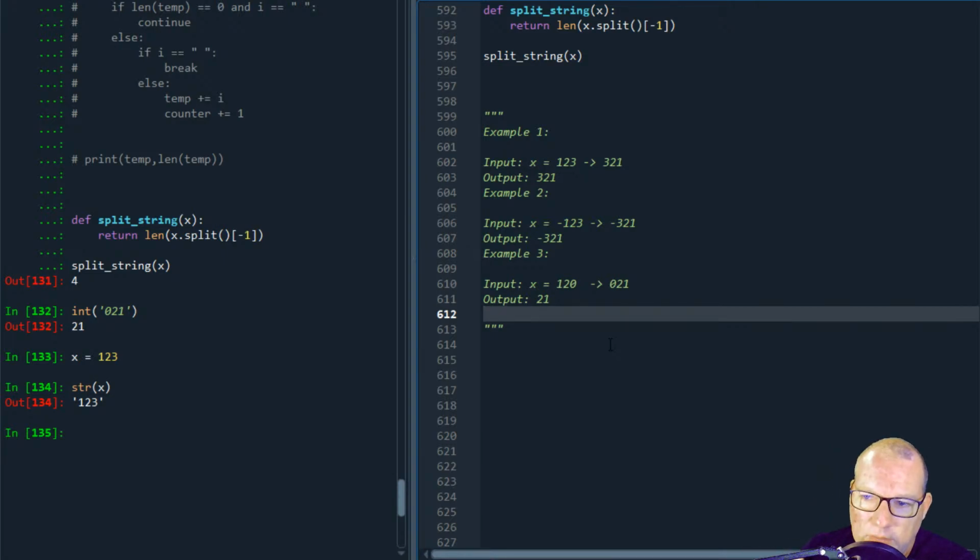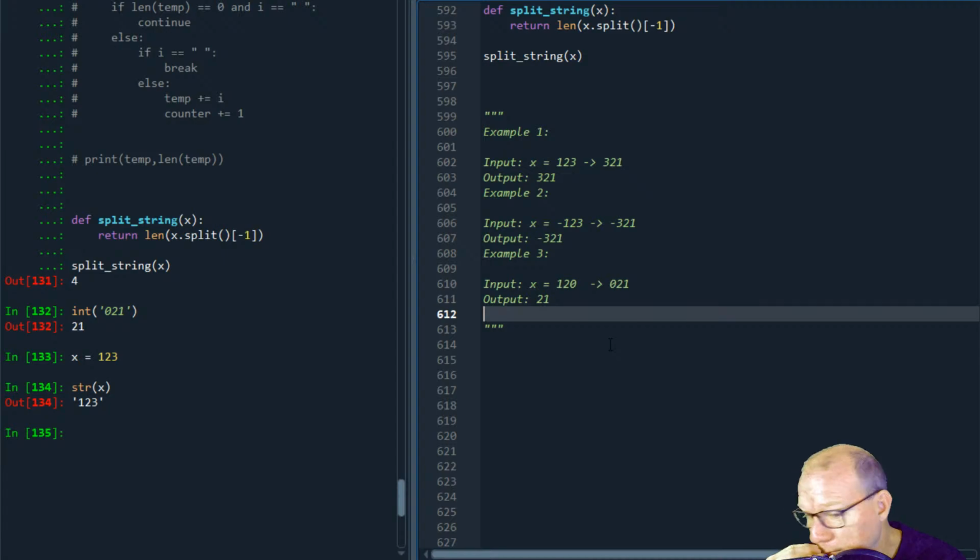So the epic was the project. The story was basically all the teeny tiny functionality. And then the tasks, every task associated with that functionality. So as I went through, I was building out everything that it was going to take. And also what it does is it helps you not be frozen and not freak out and not look at the entire project. You only look at the next little task. And the task may be an hour, maybe 2 hours, but it's bite-sized.